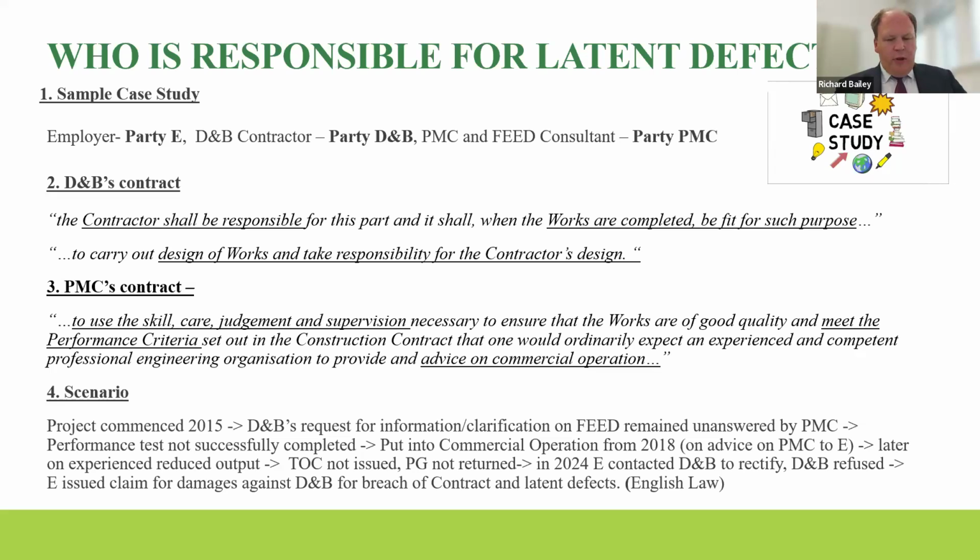Yeah, well, there's a few points, and let me go back over a couple of points Alexander's already dealt with, but I just want to capture a few things, especially when we're talking about contract and tort, and slightly to amplify one of the things that Alexander's already said. Just to point out that although strictly in the UK context, we've recently had some changes in liability periods through the Building Safety Act in respect of what are essentially latent defects in cladding and fire risk issues, where we actually, quite unusually for English law, backdated the provision to go back 30 years. So that is picking up latent defect claims, and even things that we didn't know were latent defects in claims at the beginning of the 1990s.